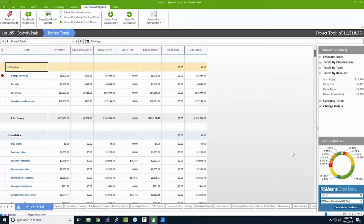Because what normally will happen by that time is by the time you're 6 months past, let's just call this job number 1, you've probably already bid on jobs number 2, 3, and 4, perhaps, in that same time frame. Well, if we're coming in over budget or we need to make an adjustment and we don't know until after the fact, you've probably now not estimated accurately for those next 3 jobs either.